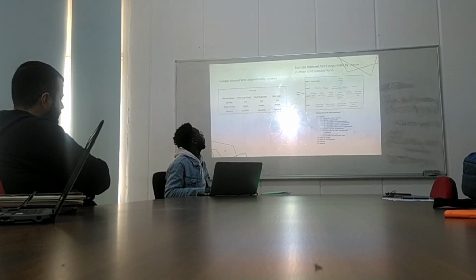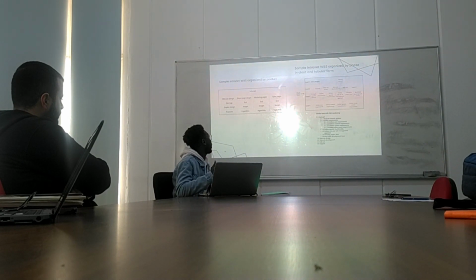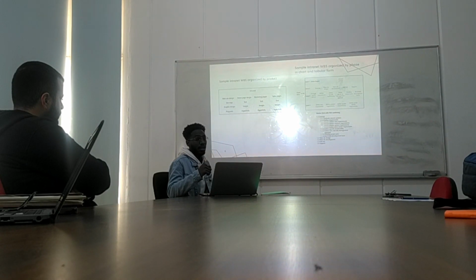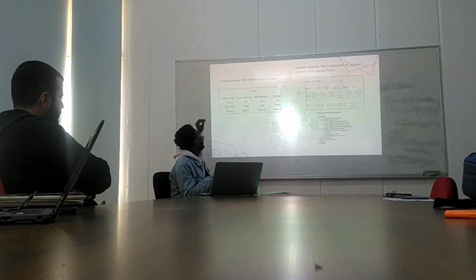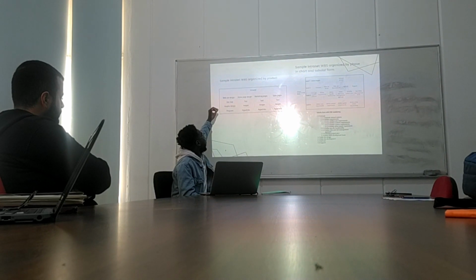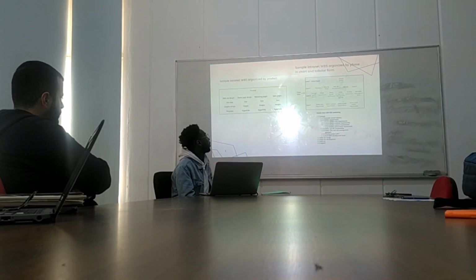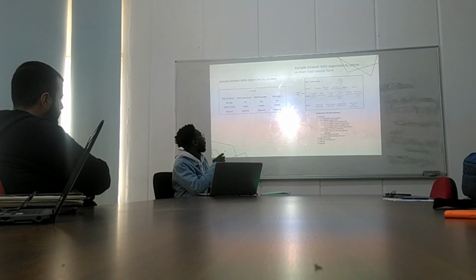So for example here we have the intranet, and then under the intranet we have the website design, the homepage design, marketing pages, and sales pages. These are all deliverables. And then under these deliverables, we have subdivided them into manageable parts. Under website design, we have design, sitemap, and then graphic design and program. And this is valid for all the deliverables that we have here.